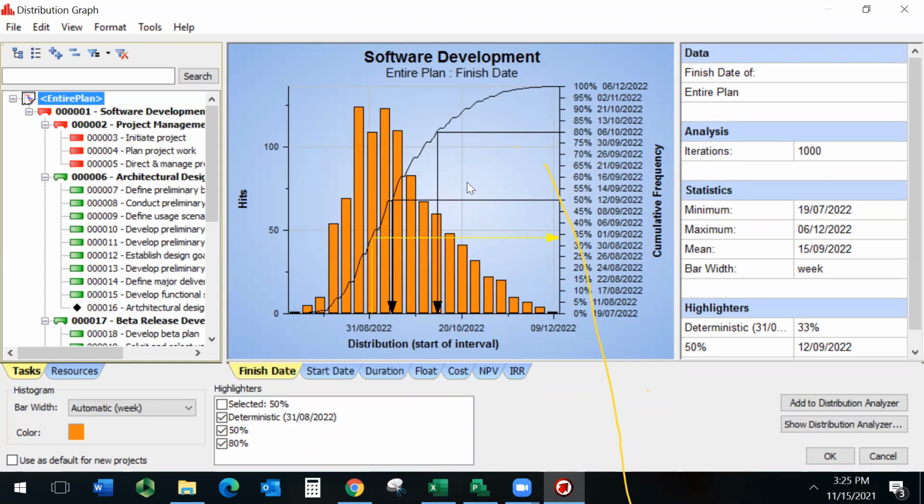If you remember the 3-point estimate formula, it's optimistic plus 4 times most likely plus pessimistic, divided by 6. Giving more weight to the most likely number means that you have more confidence in the most likely estimates of the plan. So that's what you have right here.